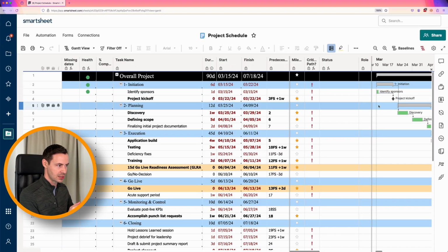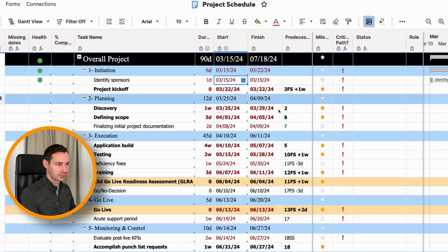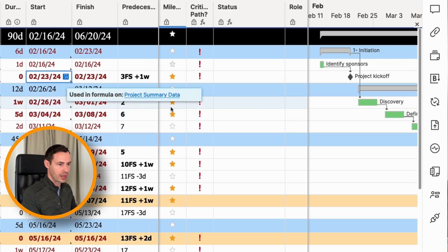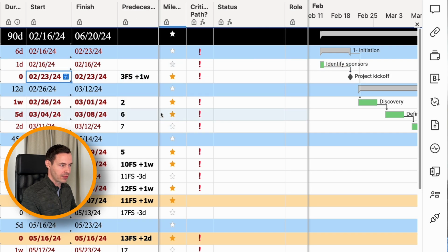In this hypothetical, let's change this so that instead of having this project start today at the very earliest task, we can see today is represented by a vertical dotted line on the right-hand side for the Gantt. I'm going to bump this back and say that we're now 4 weeks into this project. So if I do T for today minus 4W, 4 weeks into the past, I can see that that's now adjusted what we have for our Gantt view.